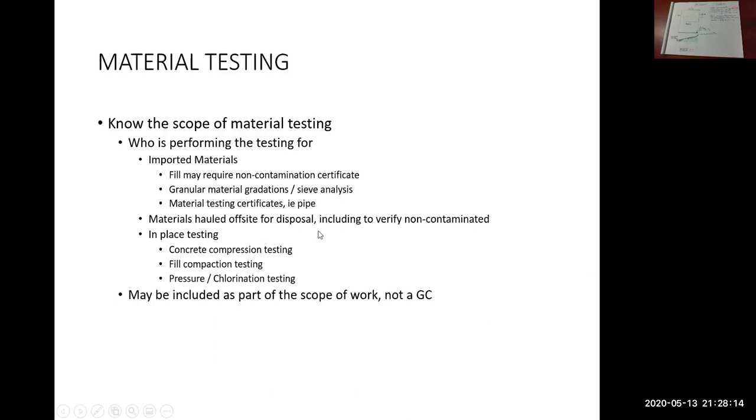So materials hauled off-site. Again, you the contractor have to confirm to the dump site that the material, so the excavation that you're hauling, isn't contaminated. So again, that's different than materials testing. That is sometimes provided by the owner. They've already done that.